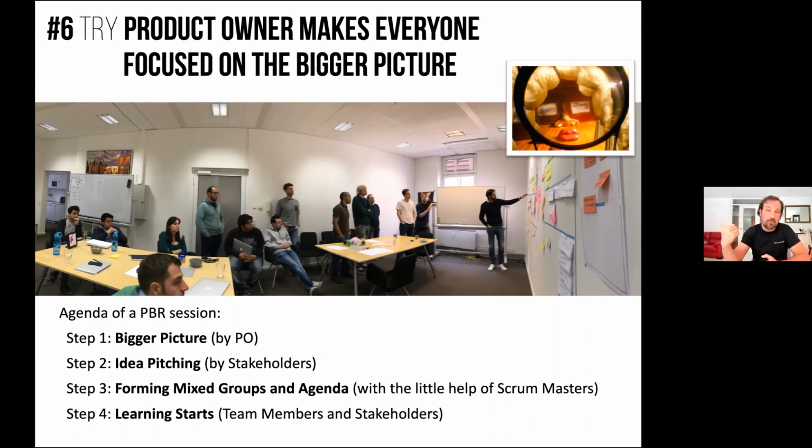First of all, it's cool to meet and work with new people, right? Second of all, this group consists of people from every team, hopefully, right? So when they're talking to a stakeholder, every team is now insourcing some information from that stakeholder, and that creates the freedom and flexibility for now any team basically to work on that particular item in the backlog.